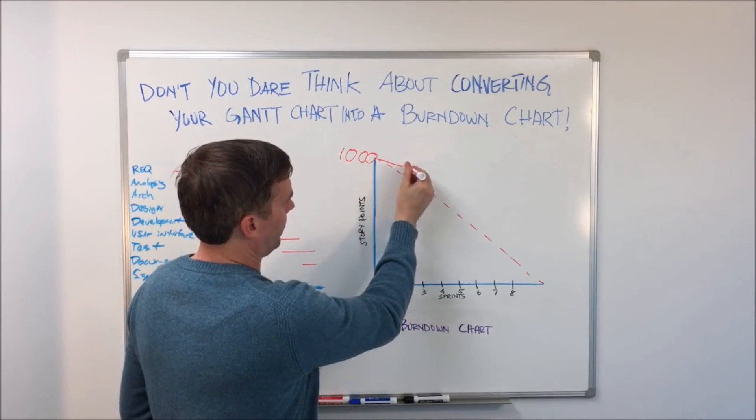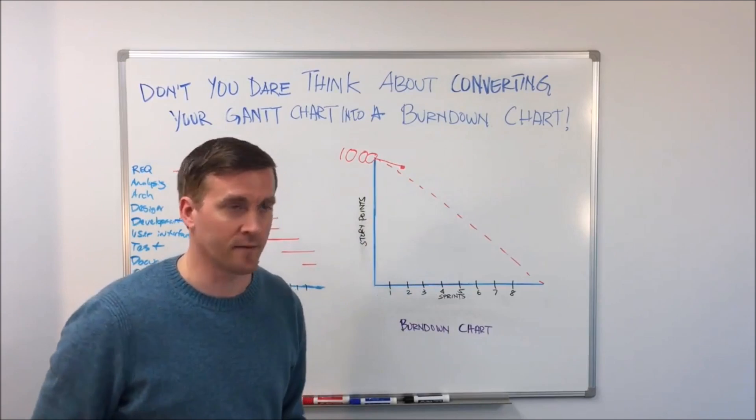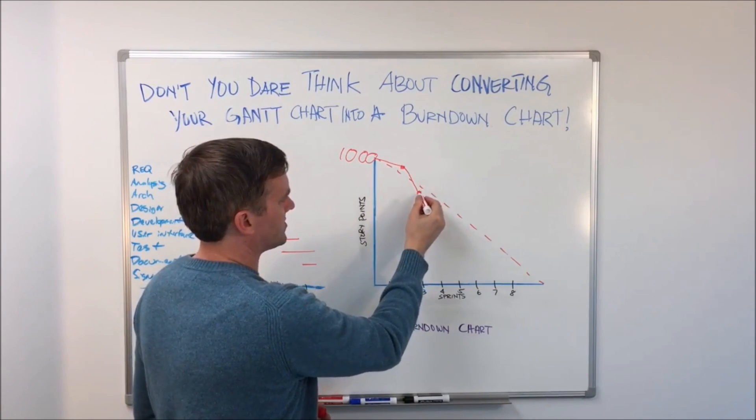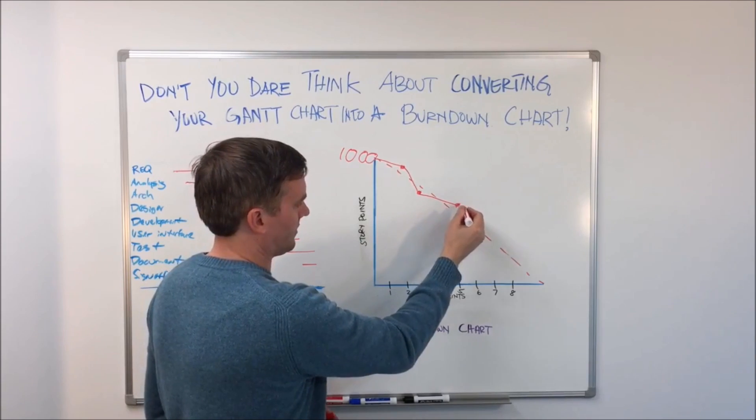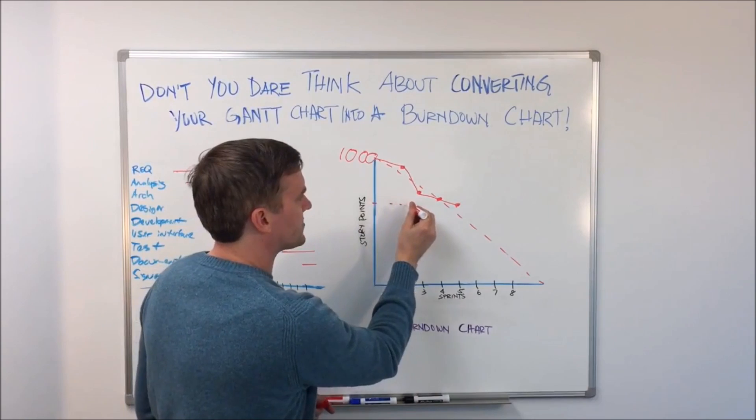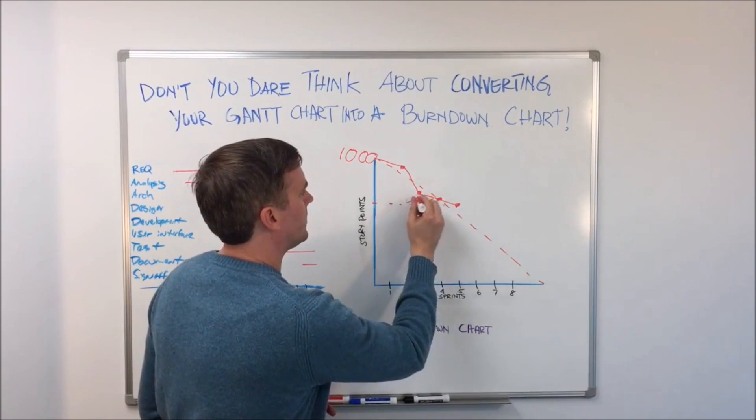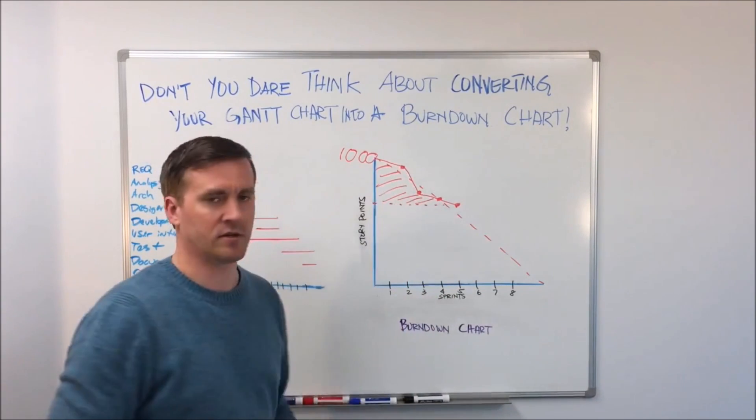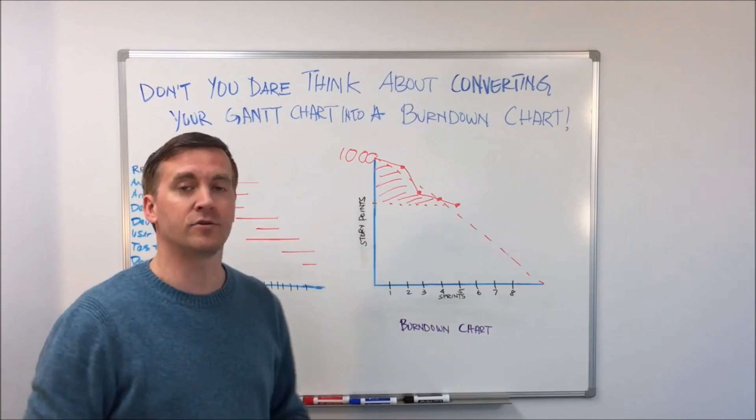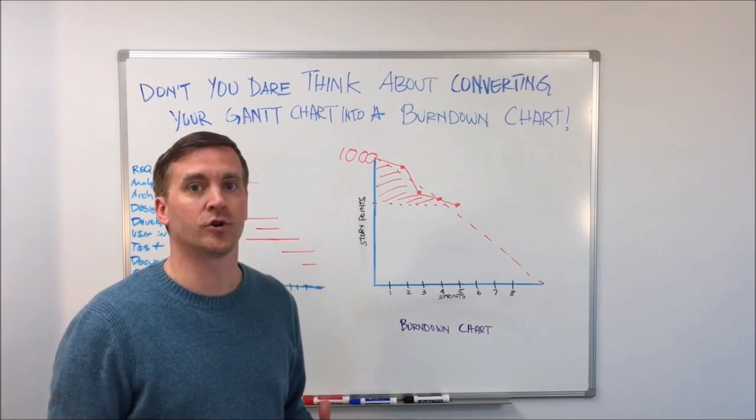So in real life, if after sprint one we completed this much work here, and after sprint two we completed about that much work, and sprint three we finished out to here, sprint four, all of this work you see here is finished, it's ready to go, it's shippable, you can use it. Whether or not you ship it is up to you, but the point is you could use it.